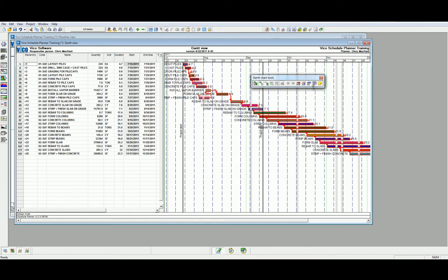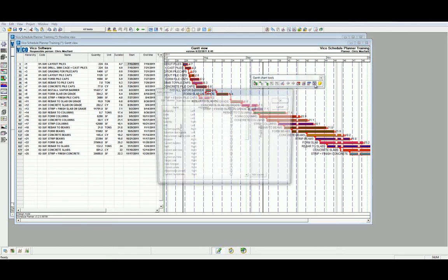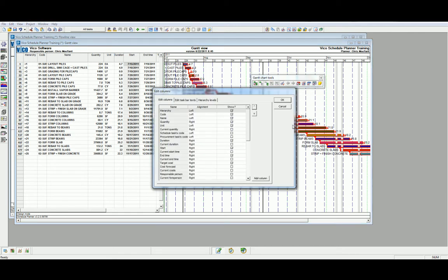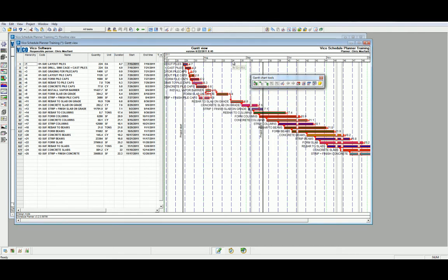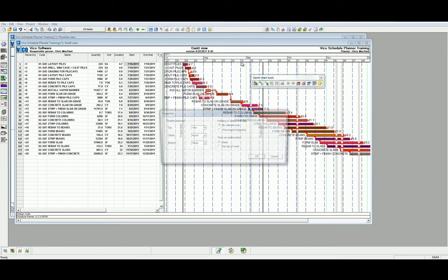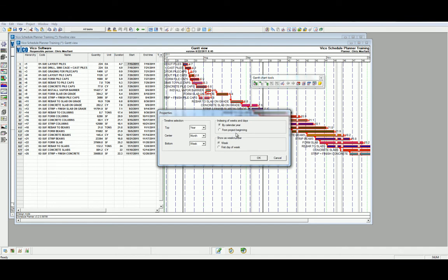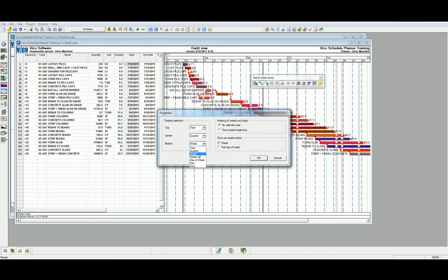We also have a quick key here which allows us to edit the columns if we require. Finally, if we right-click on the calendar at the top part of the Gantt Chart View and select the Properties Function, we are able to modify the timeline selection. At the executive level, I would often recommend showing the top in years, the center in quarters, and the bottom in months.